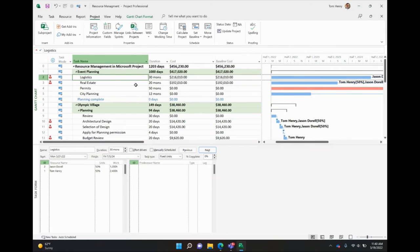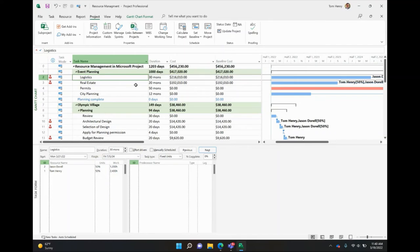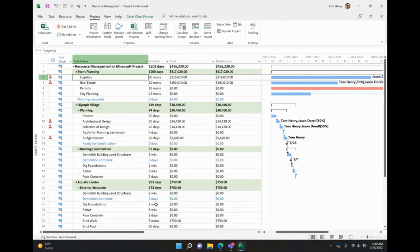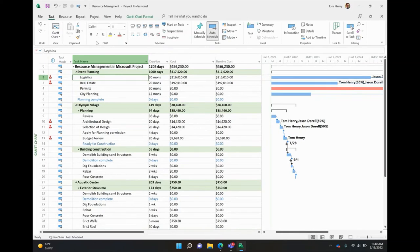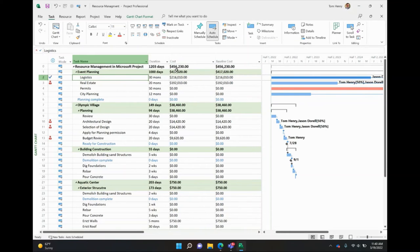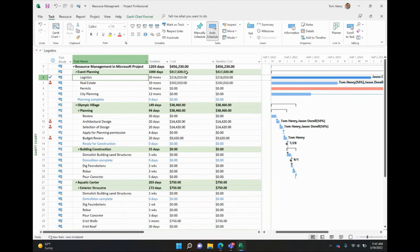You have three different ways to track project progress in Microsoft Project. You have the percent complete method, actual work and remaining work method, and actual work per period. I'm going to drill into those now. So the easiest way to track the percent complete of the work in your project, I always start with the easiest, is to come to the task ribbon and click on the task and actually mark the percent complete here. There we go. I'm going to say 100% complete. That task is now done. The costs are now actual costs. The only difference is if you look at the baseline and the cost, there's no disparity between the two. We just said it's done. We don't know when it started. We didn't know if it took longer.